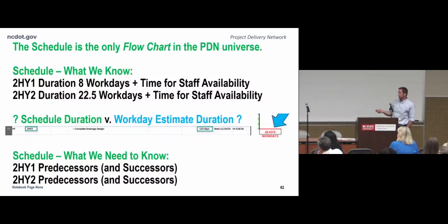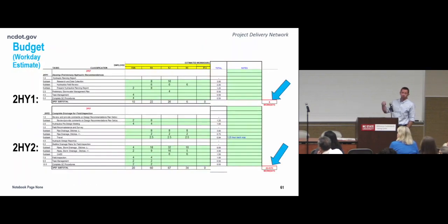So after developing this, you will return it to the PM. In the case of an in-house project, or if you are a GEC, you will be doing a comparative estimate that the PM will then compare to a PEF estimate, and then you have to go into negotiation if they're not within certain dollar and day thresholds.